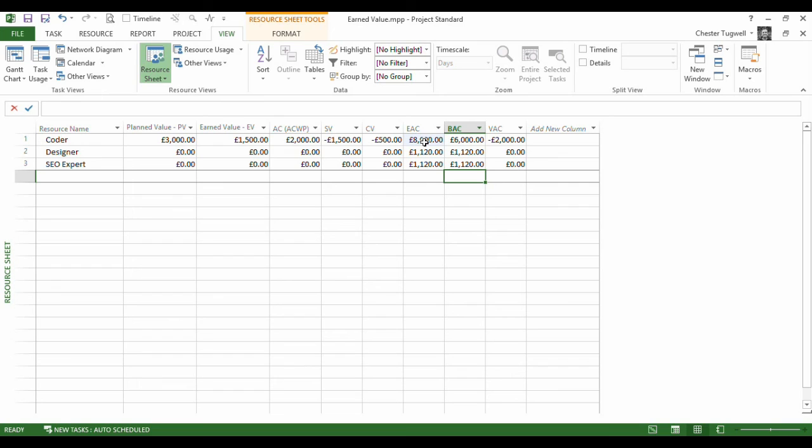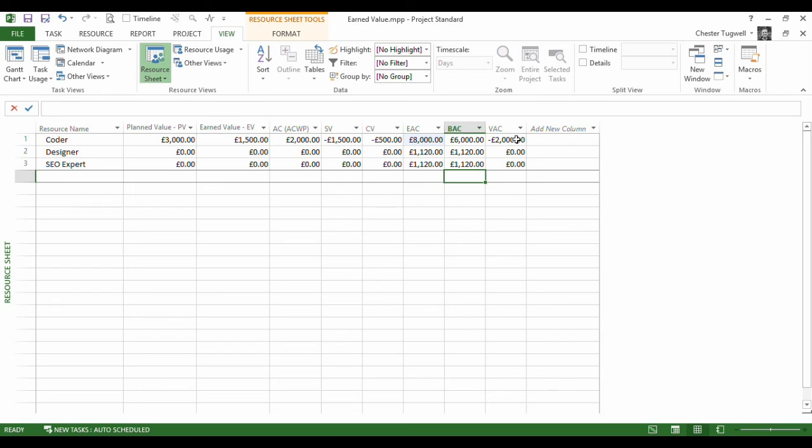Now if you want to see the exact calculation involved in that, if you follow the link in the YouTube description, you will see the calculation in the little written tutorial that we have on our website. This value here tells us the difference between those two figures. So a negative figure tells me that there is going to be an overspend.